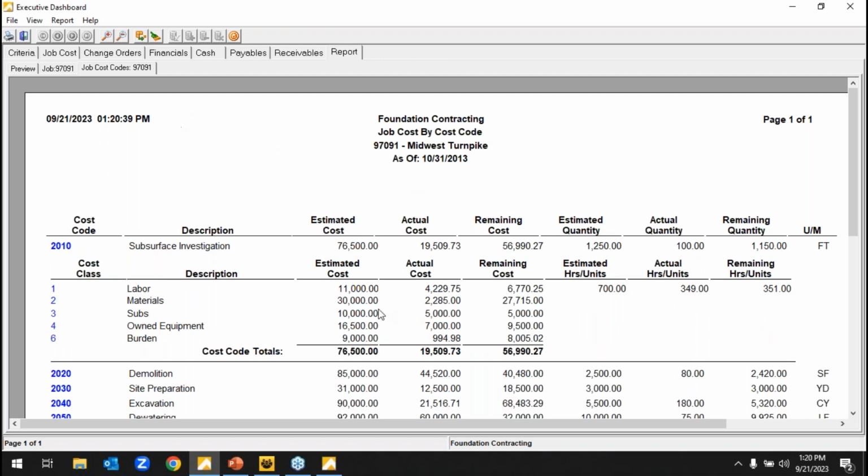It's like, oh, we did this task, this subsurface work, and $4,000 of that task was labor. There's our associated burden, right? That's your company share of FICA, FUTA, SUTA, workers' comp, fringes, general liability. So you get a full, true allocated cost to your projects from the payroll. That's if you're doing your payroll in-house or getting your time cards in the system and having Payroll for Construction or the payroll service finish it up.